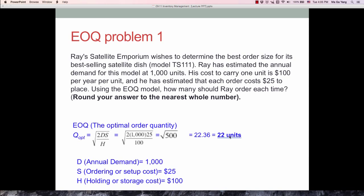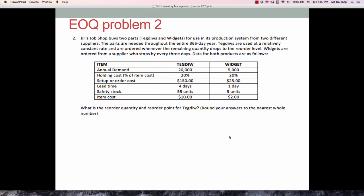Look at the second problem. This is the Glow Shop and Drop Shop problem. There are two different items in this company. Annual demand and holding cost - holding cost is not exactly shown, but it is a percentage of item cost. So item cost is given, so we can multiply this 20% which is 0.2 times 10, that is your holding cost. And setup order cost and lead time and safety stock is given.